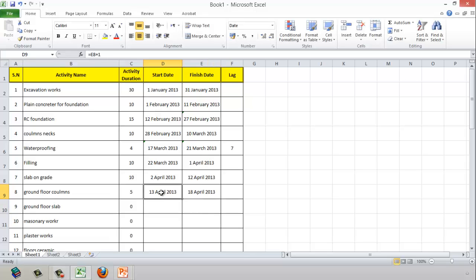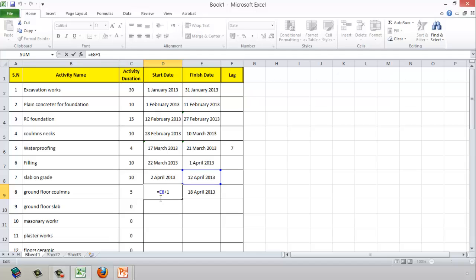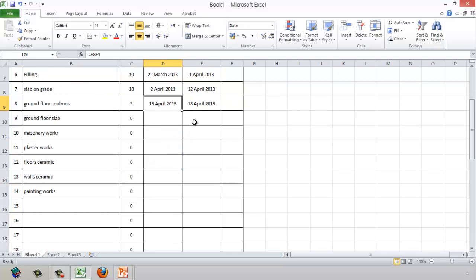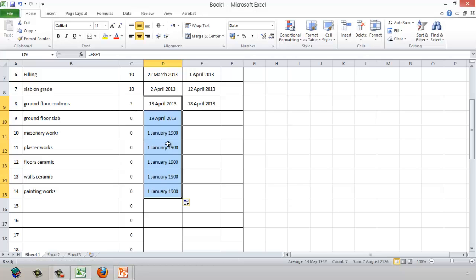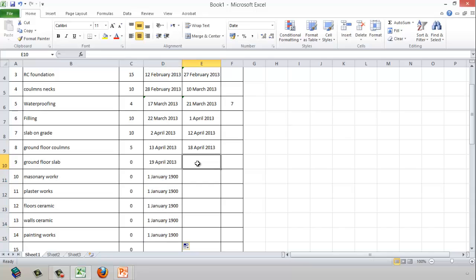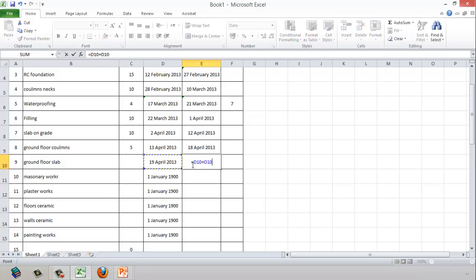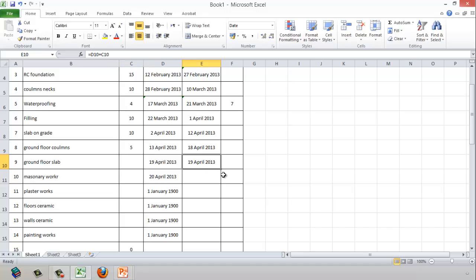Now, since I'm using this formula to calculate from the finish date of the activity above plus one day, I can simply drag it down to all rows. For the ground floor slab, I'll try the opposite operation: I'll delete the manually entered duration and instead tell Excel that the completion date equals the start date plus the duration.